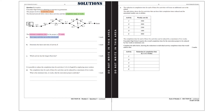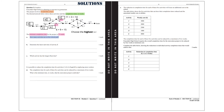For this we need to determine the critical path. We start with the early starting time, 0, for activity A. Then 0 plus 2 gives us 2 as the early starting time for activity B. Then 2 plus 4 equals 6, which are the early starting times for activities C and D. We continue like this until we get to activity F. Here we have to calculate 11 plus 3, which is 14, coming from activity E, and 6 plus 9 equals 15, coming from activity D. We are going to choose the highest value, which is 15.